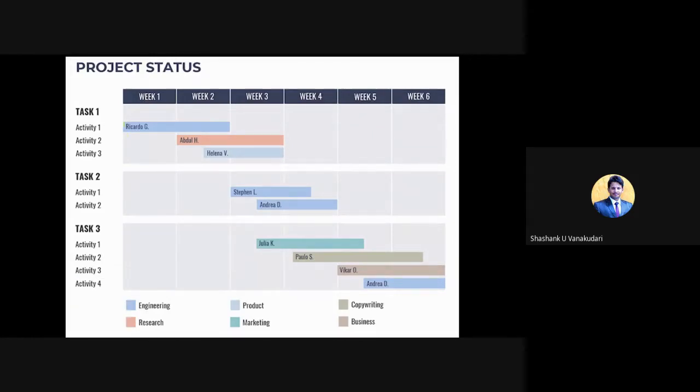Now, activity 1 is going to start at a certain time and end at a certain time. And now activity 2 has to start at a certain time and end at a certain time. But here we can't show that one activity depends on another activity. For example, when exactly the second activity has to start, whether it is dependent on the first activity or whether it is an independent activity.